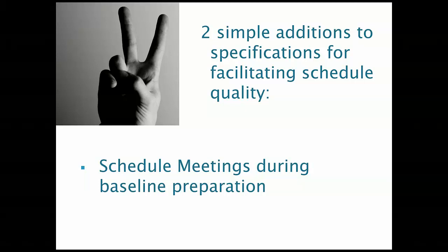There's several reasons this is important. The scheduling piece of the project, it's one of the tools, in fact, I think it's the only tool that I know of on a project that includes everyone's scope of work, whether it's owners reviewing submittals, contractors, subcontractors, vendors, design architects. Everyone involved in the process typically has some functionality or some scope of work that's included in that schedule. So having meetings early on with all the stakeholders just to get the discussion going.